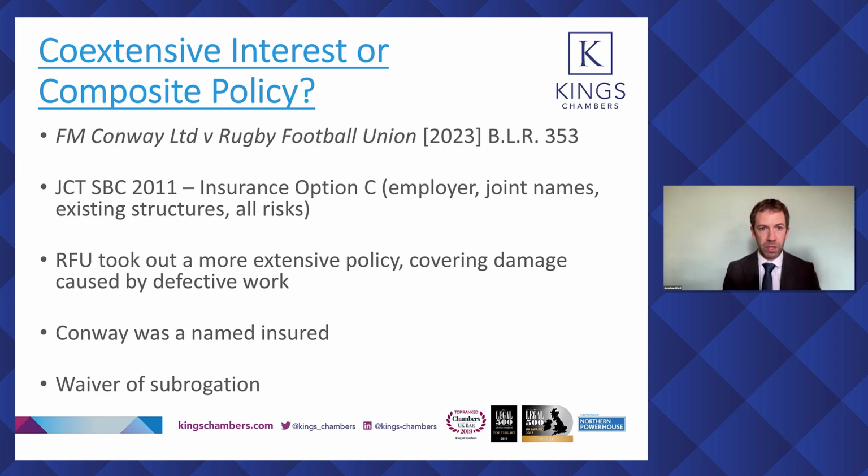And as most of you will know, "all risks" is a bit of a misnomer. It typically doesn't cover all the risks that a contractor will face during the course of a project. And in particular, it generally doesn't cover damage resulting from a contractor's own defective work. However, despite that being the limit of RFU's obligation, it actually took out a more extensive policy, and it was